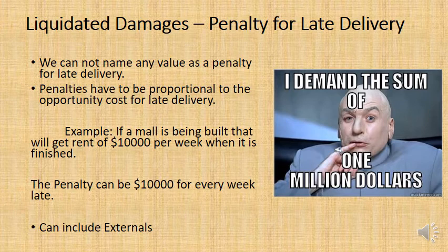A house shouldn't take 10 years to build. So in order to make sure that the contractor has good time management and the cost, quality and time constraints for the scope of works are being met, you could be offering in the tender documents a penalty for late delivery. This is called liquidated damages.